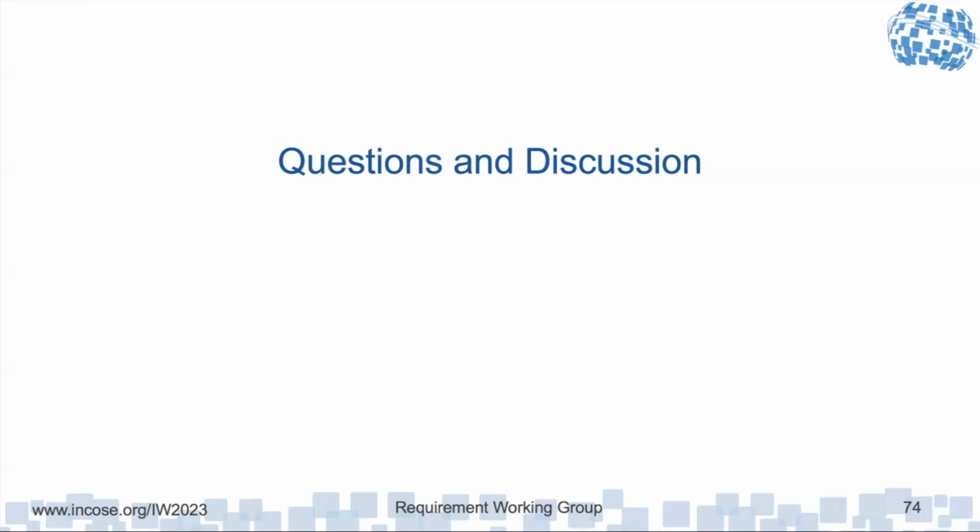And one overall problem that I've seen, and why I've emphasized verification and validation in the presentation, is that a lot of projects, especially government projects, don't bid accurately the cost and time it's going to take to adequately complete verification and validation, manage all the artifacts, and put together all the approval packages. And that could take maybe 50% of your development cost for new projects. It's kind of a pink elephant in the room: do customers really want to pay for what they're expecting of the suppliers? And how do suppliers deal with that?